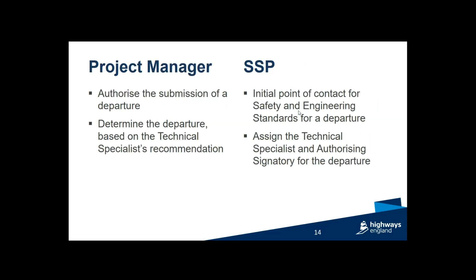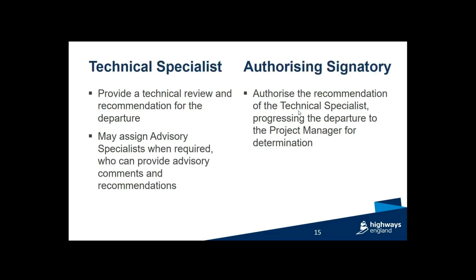The project manager, they authorize the submission of a departure and they determine the departure based on the technical specialist recommendation. The SSP, they are the initial point of contact for safety and engineering standards for a departure. They assign the technical specialist and the authorizing signatory for the departure. The technical specialist, they provide a technical review and recommendation for the departure, and they may assign advisory specialists when required. So these could be people such as external consultants who you would like to provide advisory comments and recommendations.